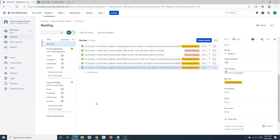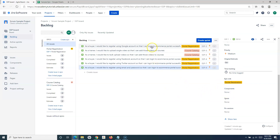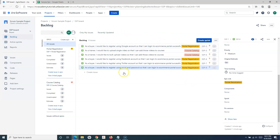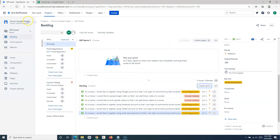Now we have the project and product backlog created. In actual scenarios, the user stories will be well defined with acceptance criteria, estimations, and story points, and then you'll start picking up user stories into the sprint. To start creating your sprint backlog, the first thing you have to do is create the sprint — simply click on 'Create Sprint'.